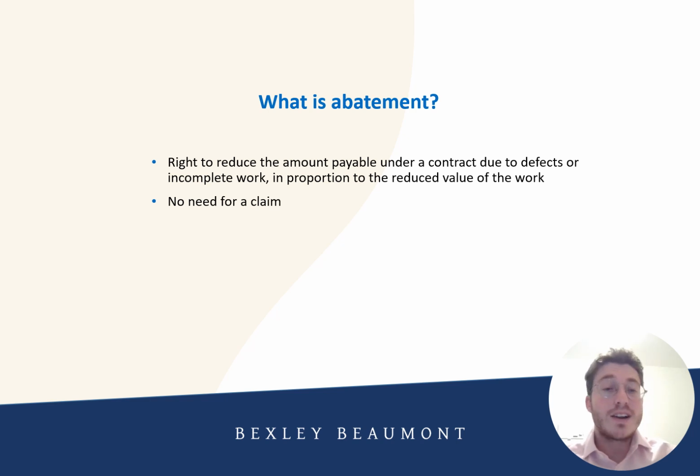Say you have a contractor who's installed flooring that's not to specification. That has made that floor worth less than the agreed price. The employer can, as a result, pay a reduced amount than the agreed price, reflecting the actual value of the work done because of the issue that has arisen. That is how abatement works in practice.